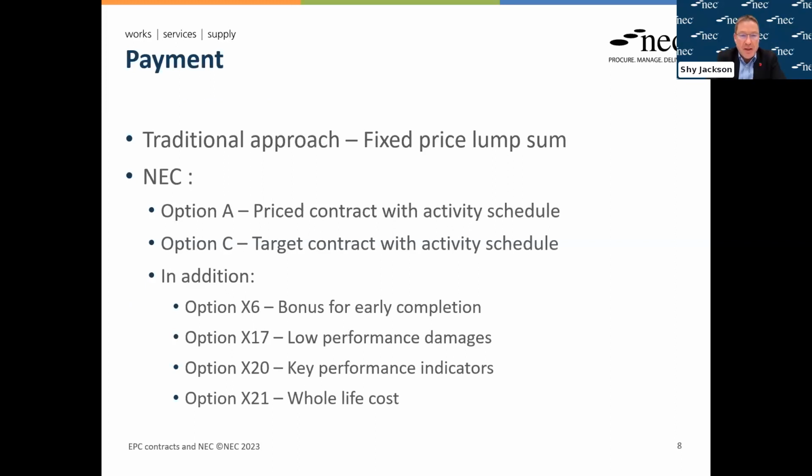Thank you. And payment and money obviously is a big part of risk allocation. And as I've mentioned before, the traditional EPC approach is fixed price, lump sum contracts on the basis that it provides certainty and it is seen as more acceptable to funders. And if that's the approach that you want to take, then NEC obviously allows for that. This is done through option A with the activity schedule, and payments are made once activities are completed.